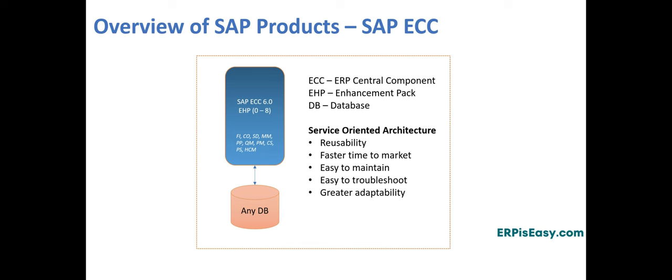Go-live. Then comes the actual go-live. After the dress rehearsal, the production cutover will begin. The transports will first be transferred to the production system, followed by the data load. Users will be unlocked and they will be able to log in and begin conducting business transactions.